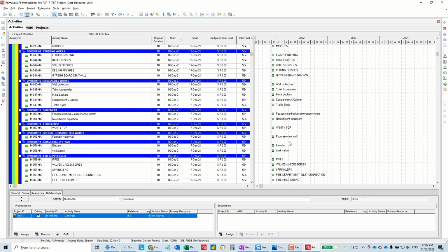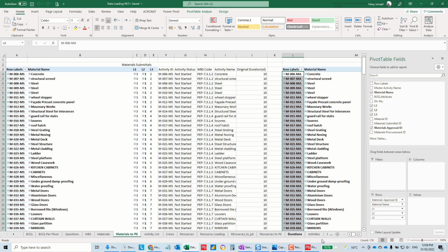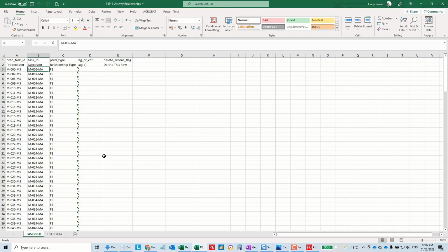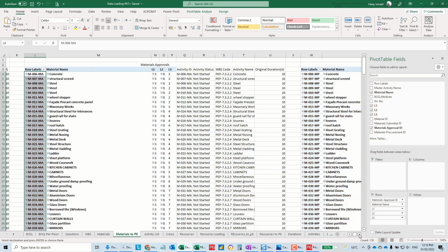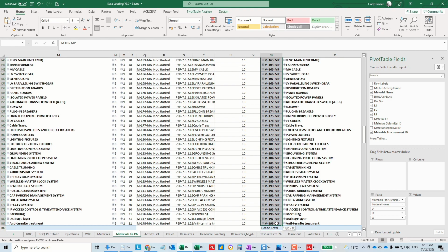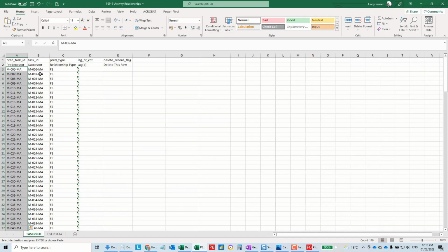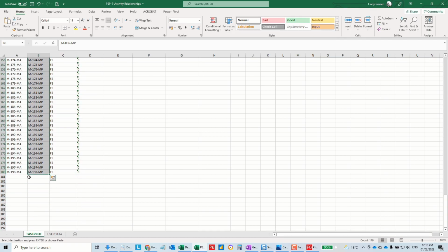What is the second step? Is to link the approvals to the procurement, right? So simply in our sheet, now we'll change this one to here, and we will take the procurement and link it now instead of the approvals. We will put it here. Be sure that it is all aligned. Okay, nothing here, nothing there.